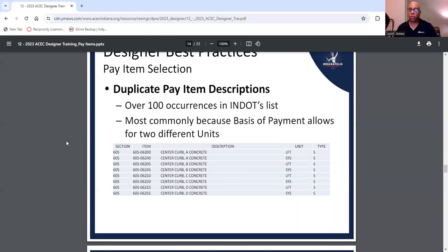Design does it that way so you don't get confused. Because when you have exactly the same item numbers, particularly if you've got a bundling contract, it's going to cause a lot of problems with overruns. And overruns cause a change order. That means you have to get an approval to get more monies